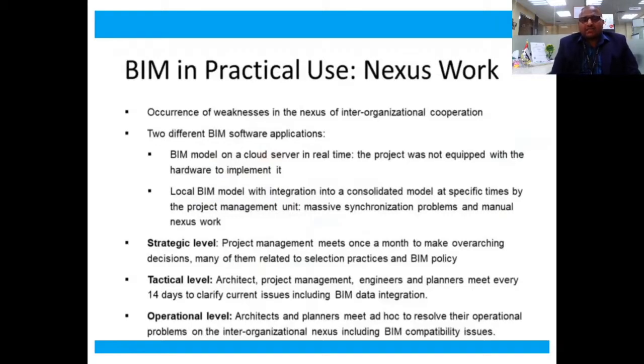At the tactical level, the architects, the project managers, the engineers and planners meet in a shorter sprint of 14 days to clarify current issues, including the BIM data integrations. So you can see an iterative process of agile methodology also being implemented to redefine the projects.